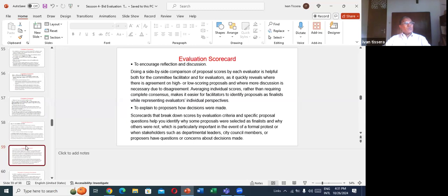Risk, of course, we consider when we prepare the bidding document and when we decide the evaluation criteria. That's why we put that the bidder should have a minimum amount of completed similar contracts, and various points we put in order to control, avoid, or mitigate the risk. So, of course, we consider risk control points.